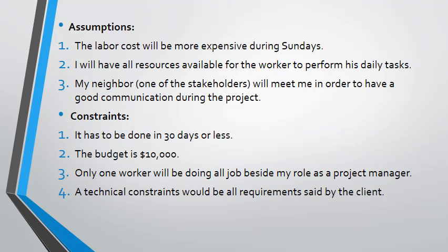There are some assumptions that we usually have that are bounded by some constraints. So on this project, the assumptions are: the labor cost will be more expensive on Sundays. I will have all resources available for the worker to perform his daily tasks. My neighbor, one of the stakeholders, will meet with me in order to have good communication during the project.